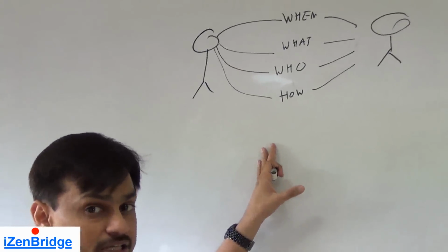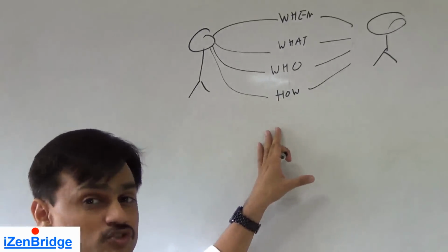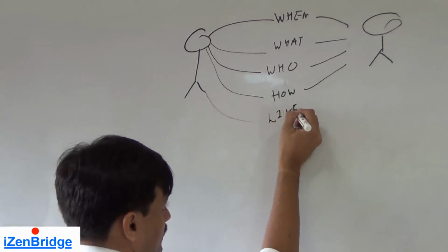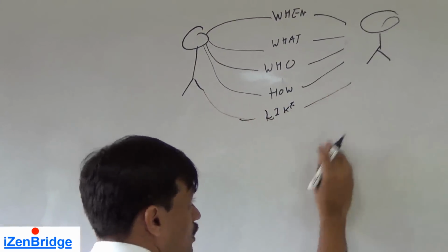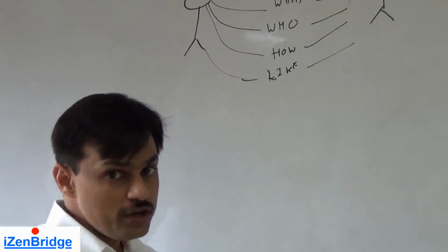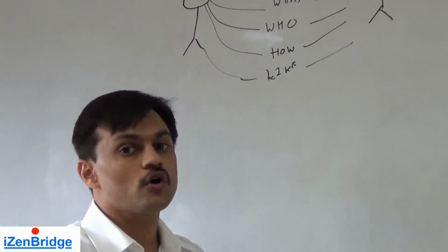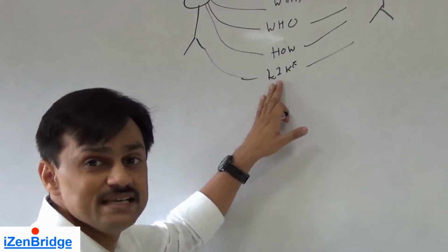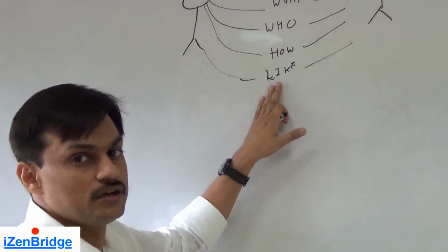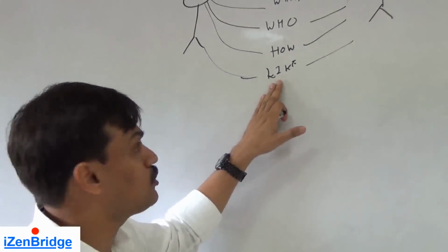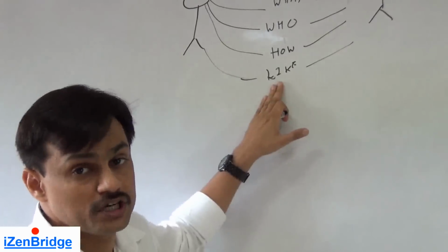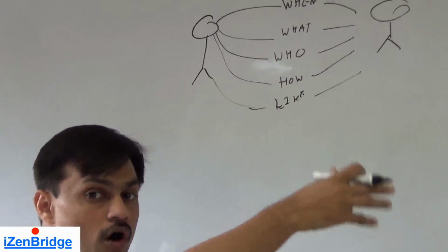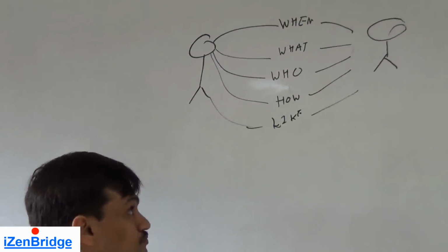Many times people believe that conflicts are primarily because of personalities, like this guy does not like the other guy and that's why they keep talking. In project management, we believe, and the various research also substantiates that belief, that personality is the least reason, or not that common a reason, of generating conflict in a project environment. We usually get conflicts more about time, cost, options, priorities.